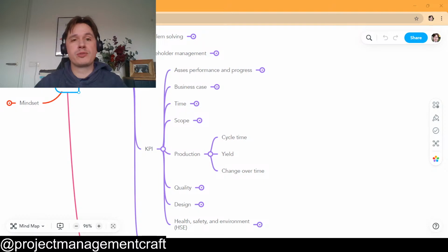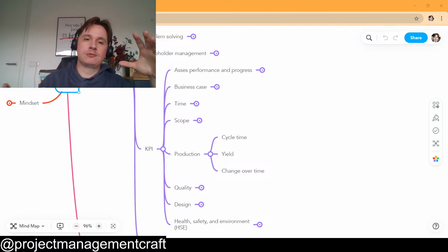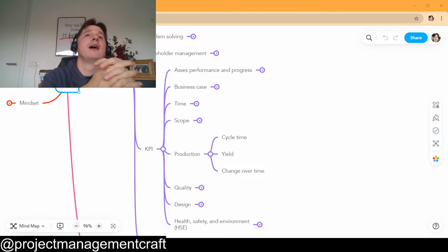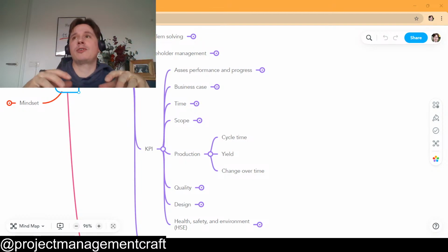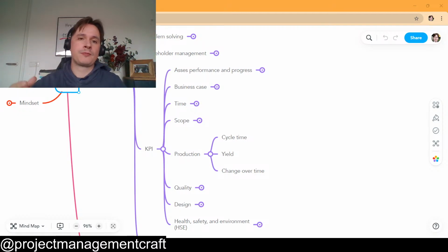For example, if you're working in construction, what KPI is always there and always very important? Number of accidents. All companies in the world want to have zero accidents. And of course, there are other KPIs that you can break down to avoid getting to an accident. You can have a number of incidents, then you can have use of personal, individual protection equipment. You can have collective protection equipment. You can have all those types of things that are done in a preventive way to avoid accidents.